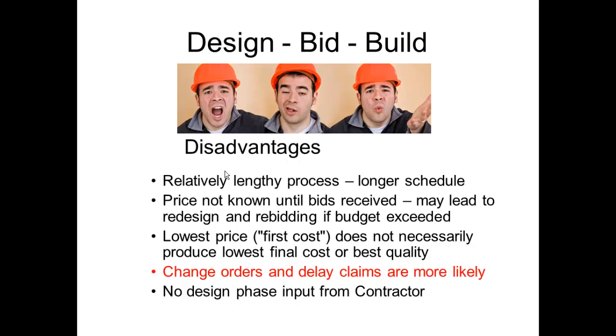And generally what we look for, I'll refer to it as low-hanging fruit, are items that could be added back into the project at a later date without having to rework anything that's already been done. It might be an HVAC system. It could be some furniture that we would take out of the project, built-in furniture that we could put in later.